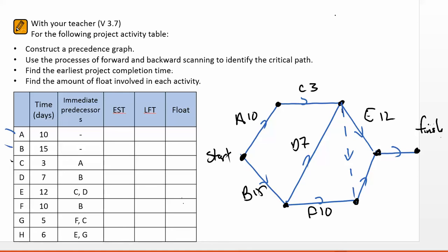and you'll notice here that G flows on to the last activity, which is H, H6, and in this lower chain, G5. Now, I've had to put in this dummy linkage here because G requires both F and C for completion, but E requires D and C. There's a few slight variants of this to be topologically correct. I'm just going to sketch in some timekeeping boxes though.